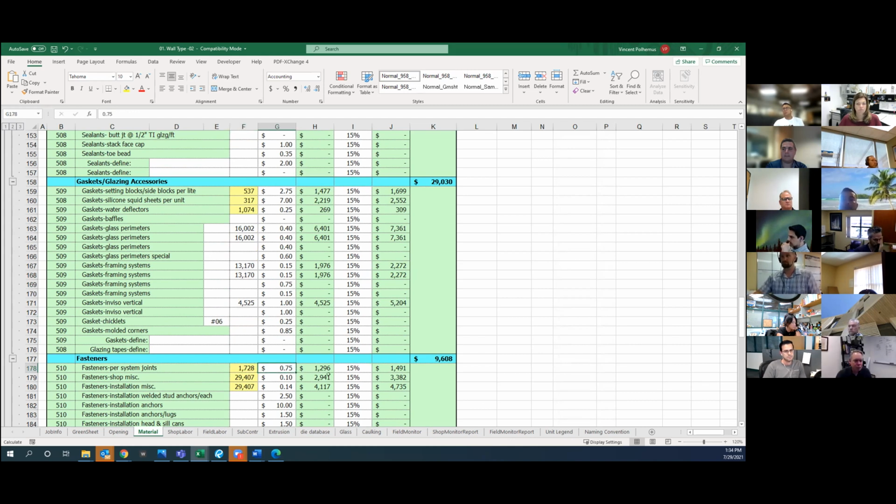This is going to assemble my units in the shop. And then we just give another 24 cents a square foot, and it gets me the numbers for that. Now, keep in mind, this is a straightforward system, so it doesn't have much else weird. My mat clip fasteners are all going to be part of my mat clips. I've picked up all my assembly fasteners here. She didn't have that many units that even start on silk hands here, so I mean that covers it.